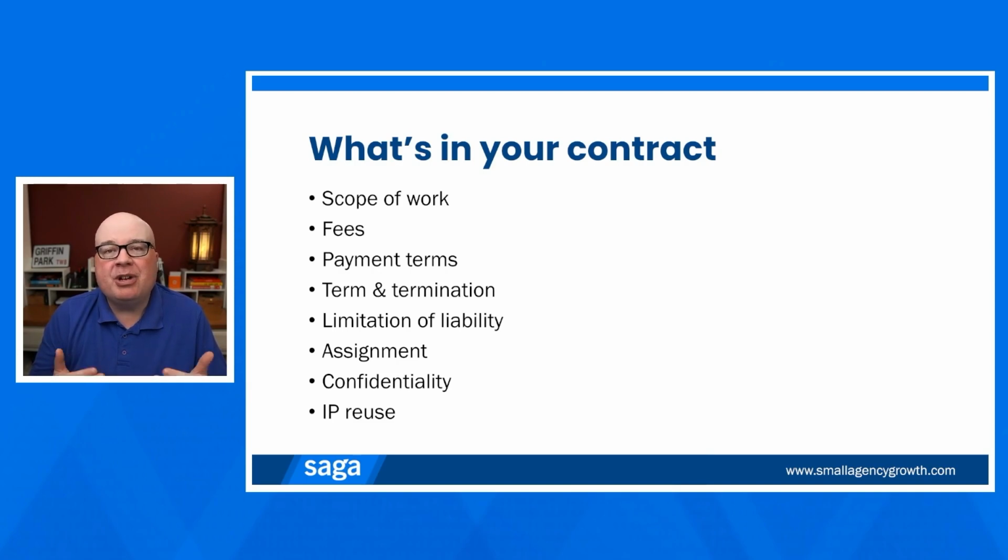And this is an area where you need to pay particular attention on payment terms, because a lot of larger clients and even mid-sized clients are now trying to get longer payment terms. The standard for many years was 15 to 30 days, and then we started to see it creep up over the last 10 or 15 years to 60 days, 90 days. And then I saw 180 days. And earlier this year, or maybe it was the end of last year, we saw one client that got a lot of attention because they were insisting on 365-day, 1-year terms from their agencies. And that's just bonkers. So make sure that you are clear on what those payment terms are in the contract.